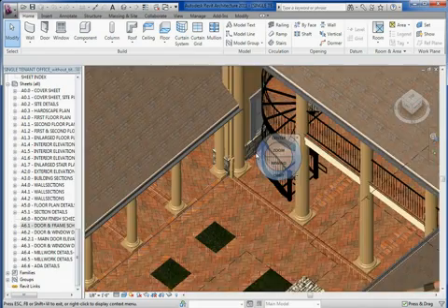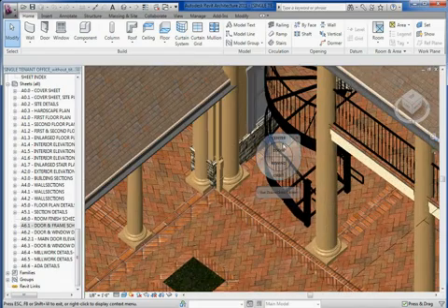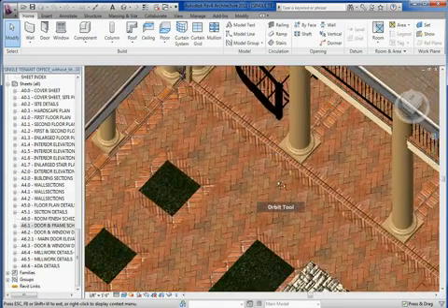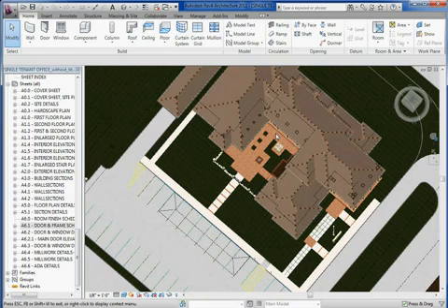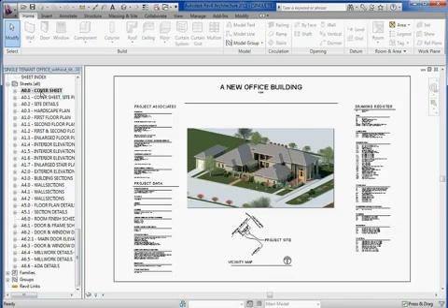Doing BIM after the working drawings have been completed in 2D CAD is an unnecessary redundancy and requires almost as much time to produce as having been produced in CAD working drawings in the first place. This almost doubles the time for documentation before construction can begin.